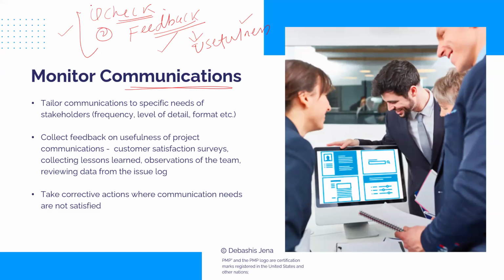No, if you find that, you will take corrective action. Maybe look, the project is green and the initial course is done, so people do not need such frequent updates. That's why they don't open their emails. So reduce the frequency of the status report maybe. Or maybe make your status report light, short. So yeah, there's a corrective action needed. So as part of monitoring, I would decide to take a step. So that was a very good question you asked. All right. If I don't and keep on doing that, this is unnecessary communication. Avoid that. The goal of monitor communication is to avoid unnecessary communication.